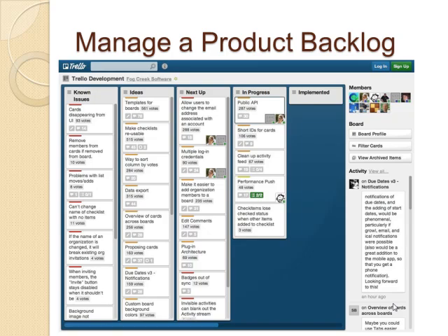And based on those prioritizations of known issues and ideas, they move those features or those user stories into the next column for what's going to be next up for the next task or the next iteration that they're going to work on. And then finally, you see in that in progress column, they're actually working on those specific tasks. So from an Agile perspective, you could name these different lists your release or iteration plan, and then move those cards into the specific iteration that you're going to be doing the delivery in.